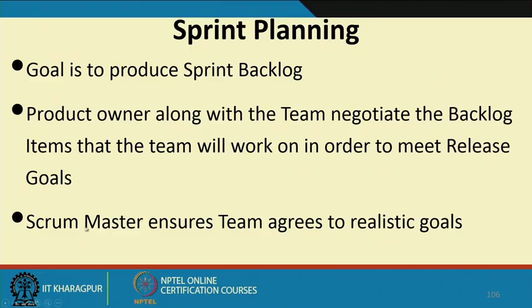The scrum master, the project manager, also participates during the sprint planning, and he ensures that the team agrees to realistic goals, because it is a 1 month iteration, and the work should be doable in roughly 1 month.